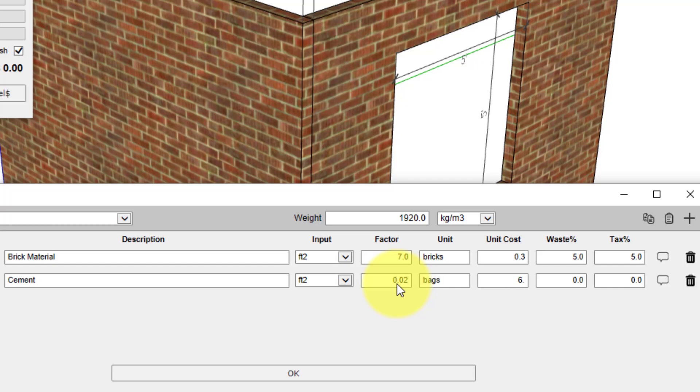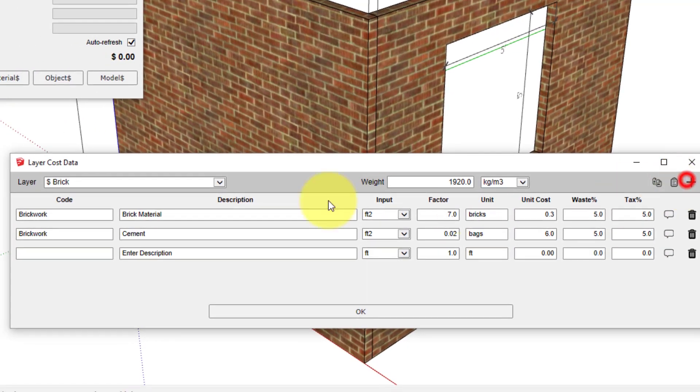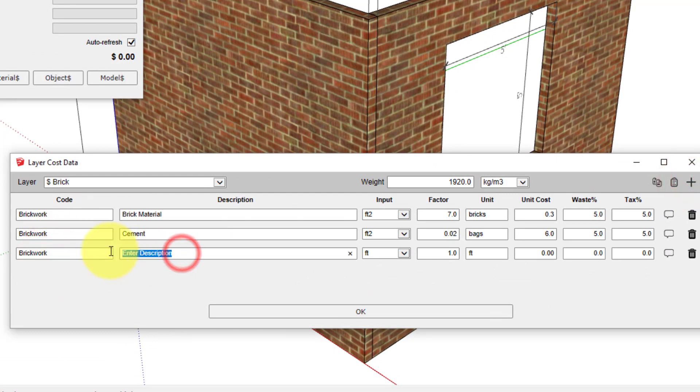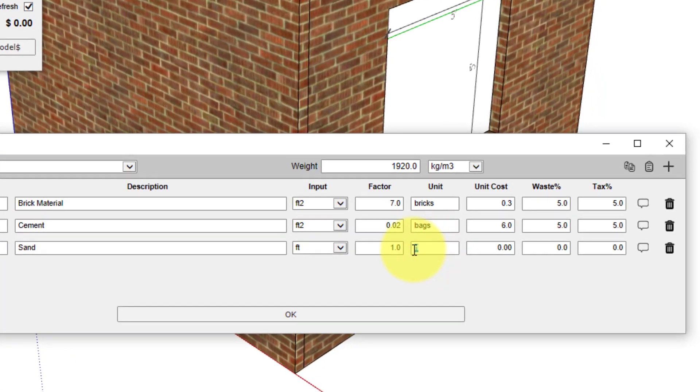The cost for one bag is six dollars. Again, I'll include a 5% waste allowance and a 5% tax. Moving on to sand, in this case we're going to use cubic meters as our output reported quantity.